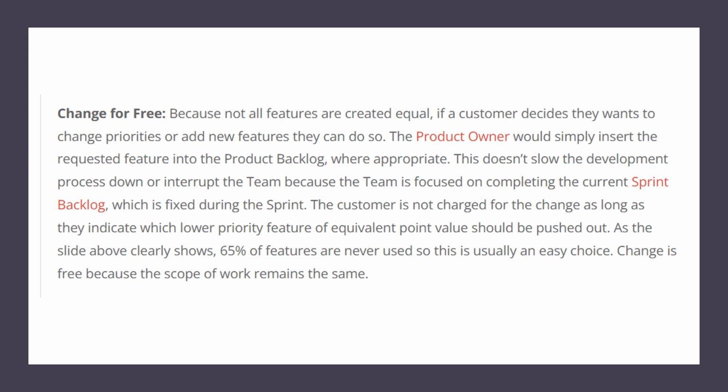The customer is not charged for the change as long as they indicate which lower priority feature of equivalent story point should be pushed out. 60% of features are never used, so this is usually an easy choice. Change is free because the scope of work remains the same.